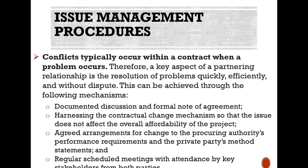Issue management procedures. Conflicts typically occur within a contract when a problem occurs. Therefore, a key aspect of a partnering relationship is the resolution of problems quickly, efficiently and without disputes. Conflicts can be resolved through the following mechanisms: documented discussion and formal notes of agreements; invoking the contractual change mechanism so that the issue does not affect the overall affordability of the project; agreed arrangements for change to the procuring authority's performance requirements and the private party's method statements; and regular scheduled meetings with attendance by key stakeholders from both parties.